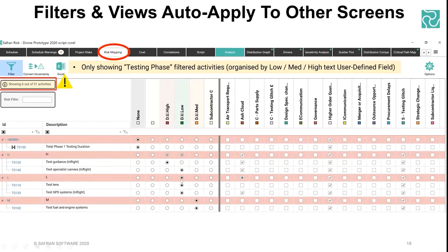Clearly, if this was a work breakdown structure, or if it was by subcontractor, I could have an estimating uncertainty specific to just that subcontractor, because maybe we've used that subcontractor, so we've got good data on how well they perform based on what they quote. That's where some of the power of the global risks that I mentioned earlier can come in as well, because that can act as a repository, as a historical repository, as evidence for future projects. So if you're running a project that's going to last for 5, 10 plus years, then that might be something you would like to investigate using. But broadly speaking, that speaks to the power of this.